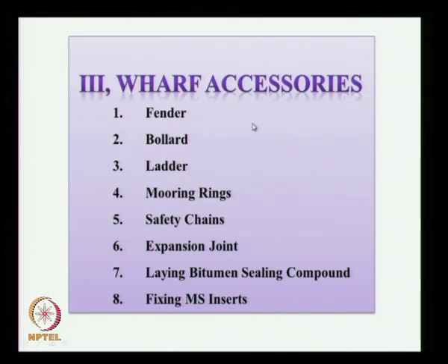Then we have the wharf accessories, the third system, that is the fender, bollard, ladder, mooring rings, safety chains, expansion joint, the expansion joint laying bitumen sealing compound and fixing of MS inserts. This is either for conveyor system or for cranes, this insert has to be placed. So these are the various wharf accessories. This we have to design and accordingly we have to provide this in the estimate for various items.